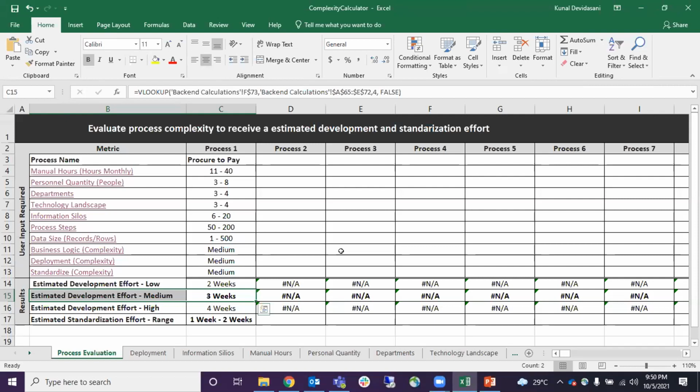And we also consider, like I mentioned, the go live, the process documentation, and the buffer time. All those things need to be part of our consideration before we give those estimations to our clients. So one aspect is we give these estimations at the time when we submit these proposals.